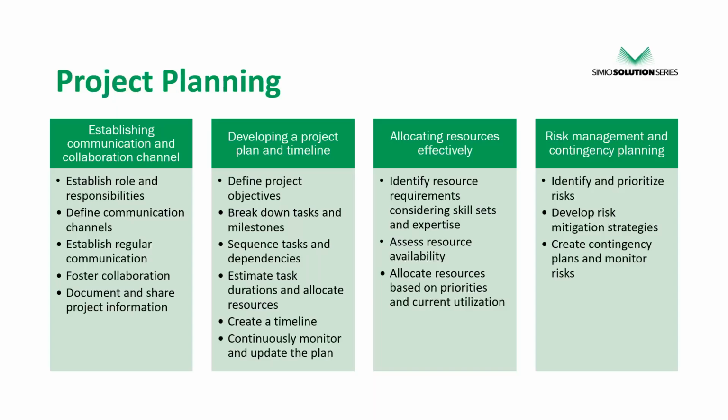And then setting up channels to foster that collaboration, right? So if it's regular meetings, or a team chat window where everyone gives updates on what they're working on and the progress. It's some type of organized cadence that the whole team has agreed upon around how we're going to give updates and keep everyone up to speed on the project progress.